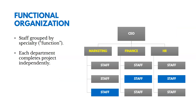In a functional organization, staff is often grouped by specialty or functional area — marketing, finance, HR, and so on. Each department oftentimes completes projects independently. On coordinated projects, the coordination is often done by the functional manager. There's not really a project manager overseeing the work — it's really a coordinating role, not a role where they have management of the resources.